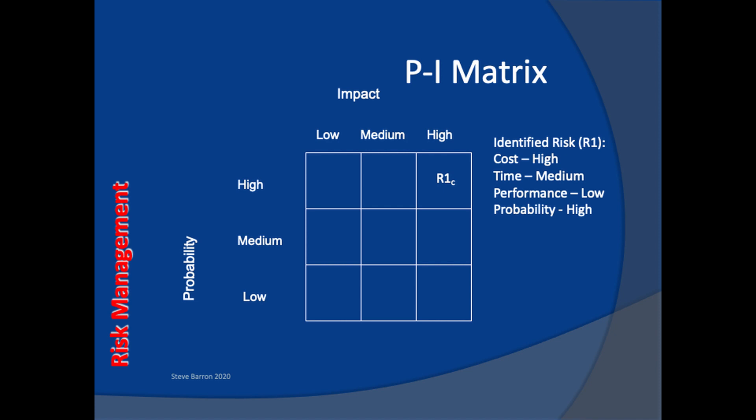Some risks may only affect project costs such as risks due to changing currency exchange rates. Some risks might only affect the project schedule such as unconfirmed delivery dates. A risk that can affect quality is the introduction of untested technology, though this can also affect time and cost.